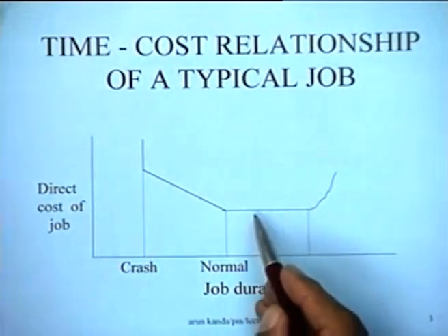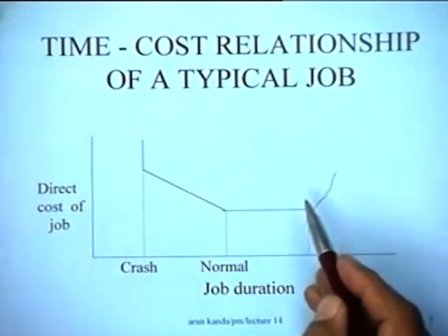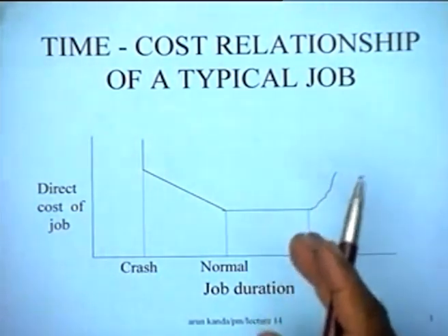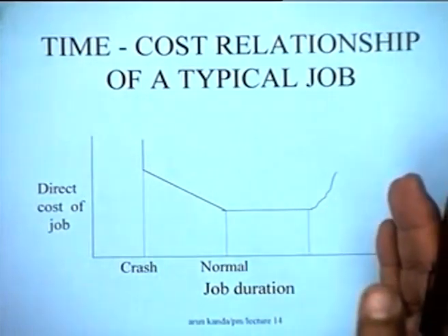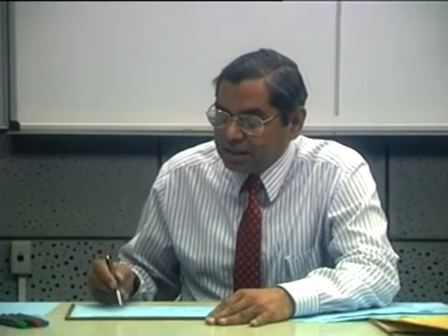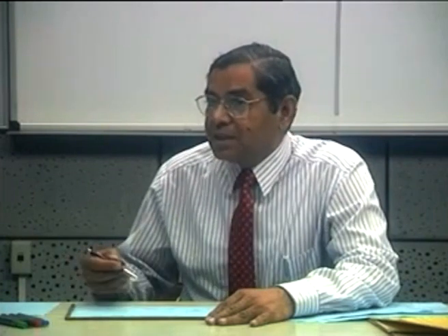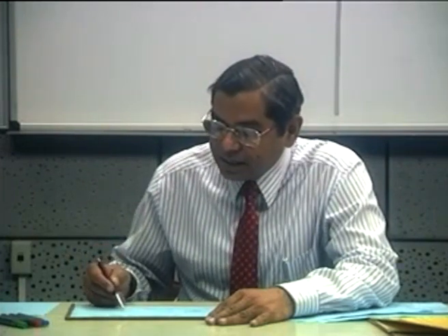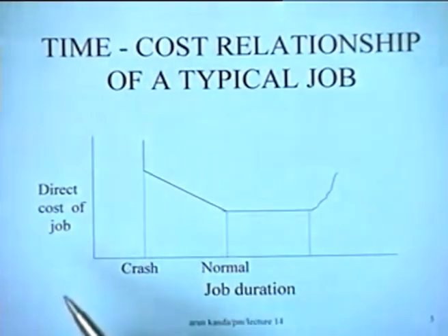So if you keep on delaying the activity beyond a certain limit, the costs of performing that activity increase because of the costs associated with the delay, the deterioration of parts that you have obtained, and various other things. There could be a price escalation and things of that kind. All these things mean that if you are delaying it beyond a certain level, it becomes uneconomical to do the activity. That's the idea.